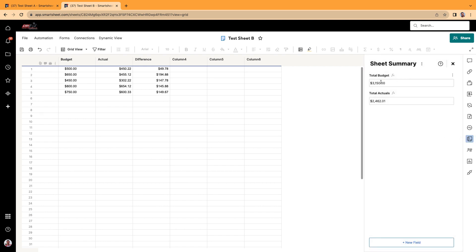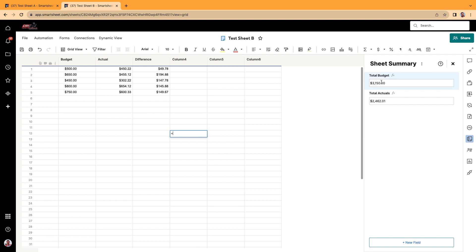And what's cool is if you want to reference a sheet summary within a cell. Maybe I want to do it way down here. You're just going to go ahead and click on this. Click on the cell in the sheet summary. And it comes in as total budget. And notice it has a pound sign.